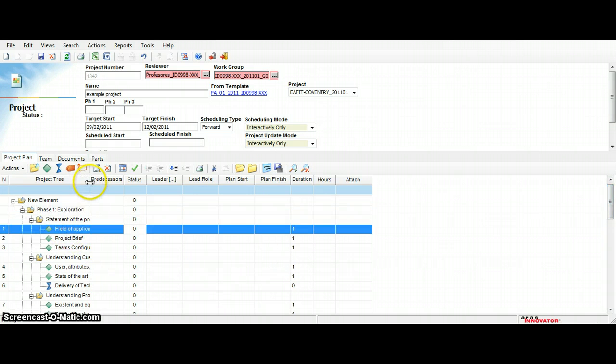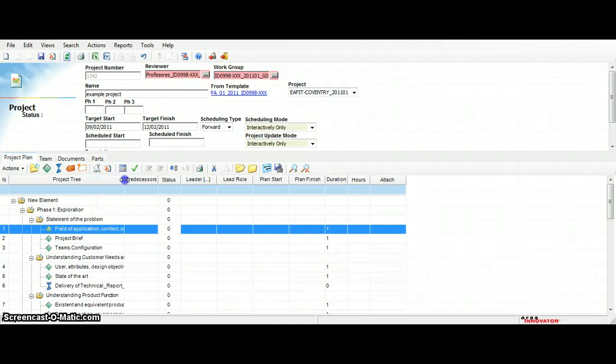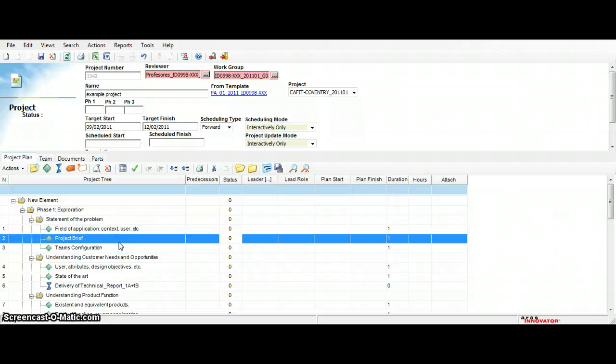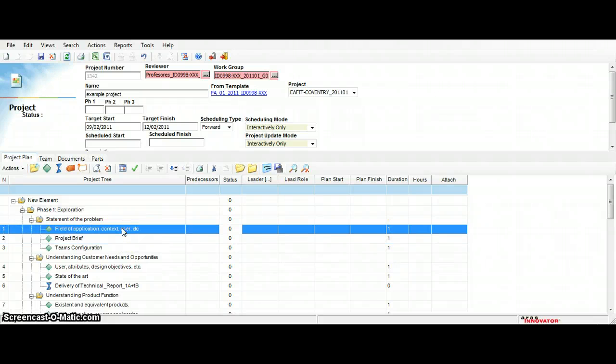The ones with the green diamonds are activities, and the ones with this blue kind of watch are deliverables, which are called milestones. They don't have a specific duration. They don't have a duration in days, but they will be deadlines to hand in stuff. So if you already have a template, you might also want to complement this program or this methodology with new tasks or new milestones.